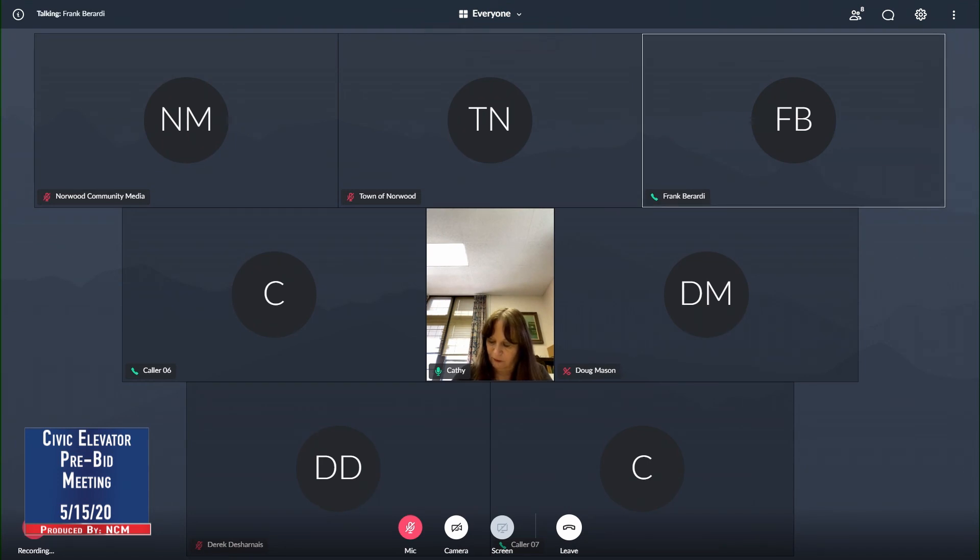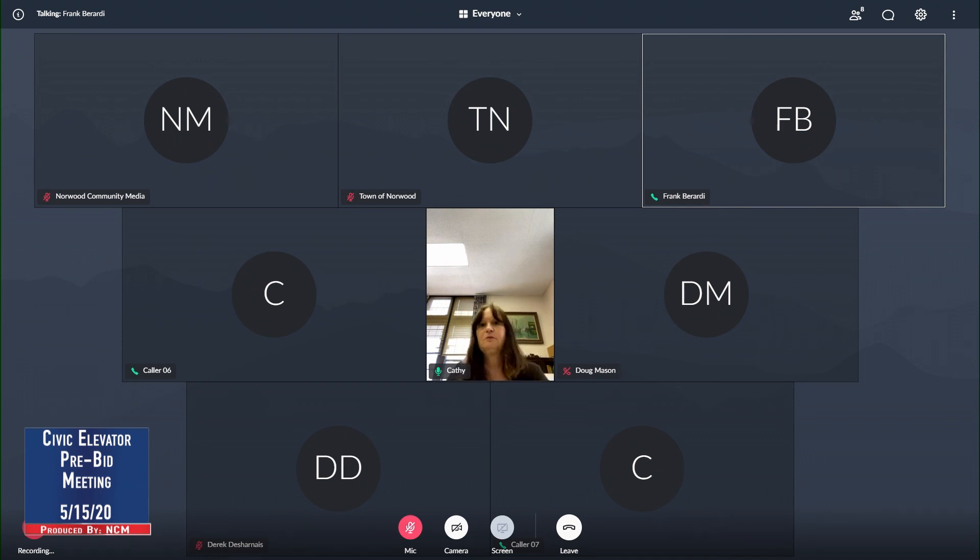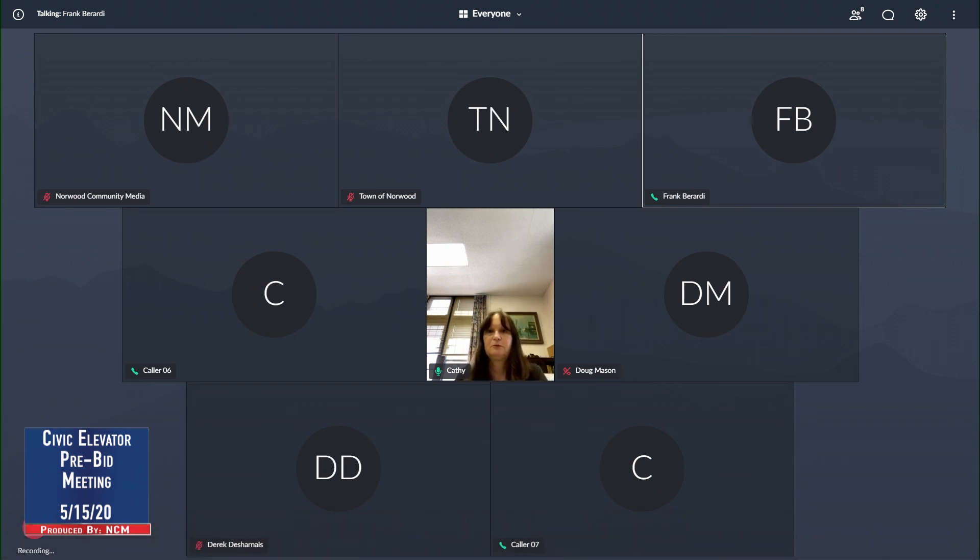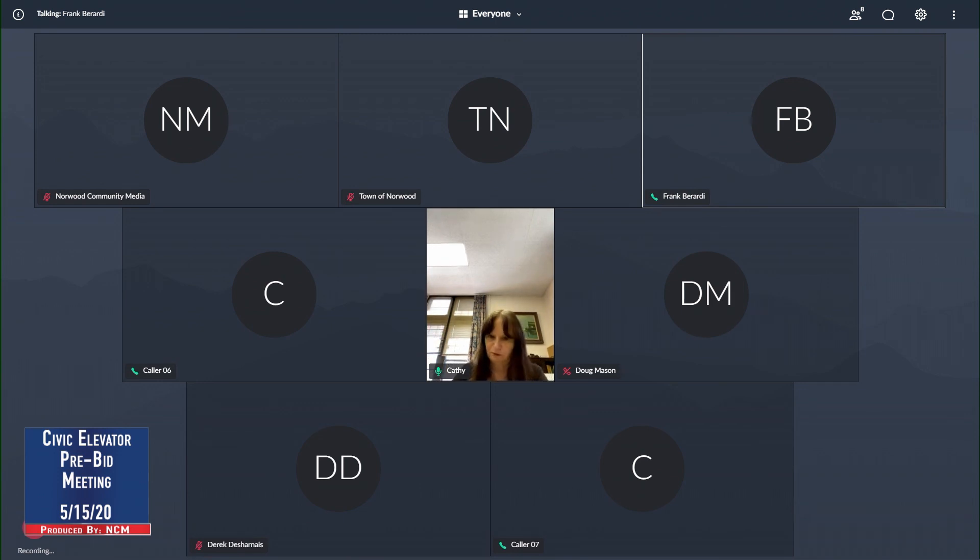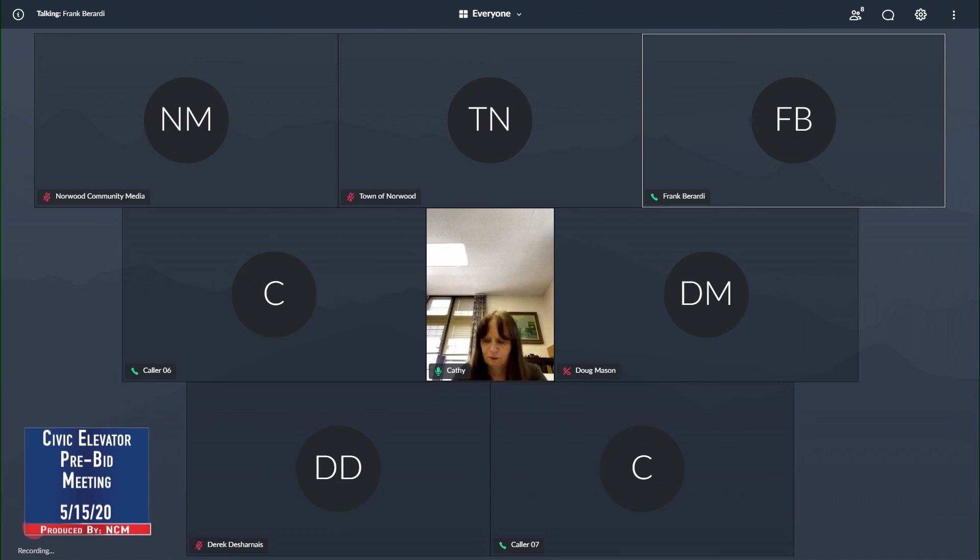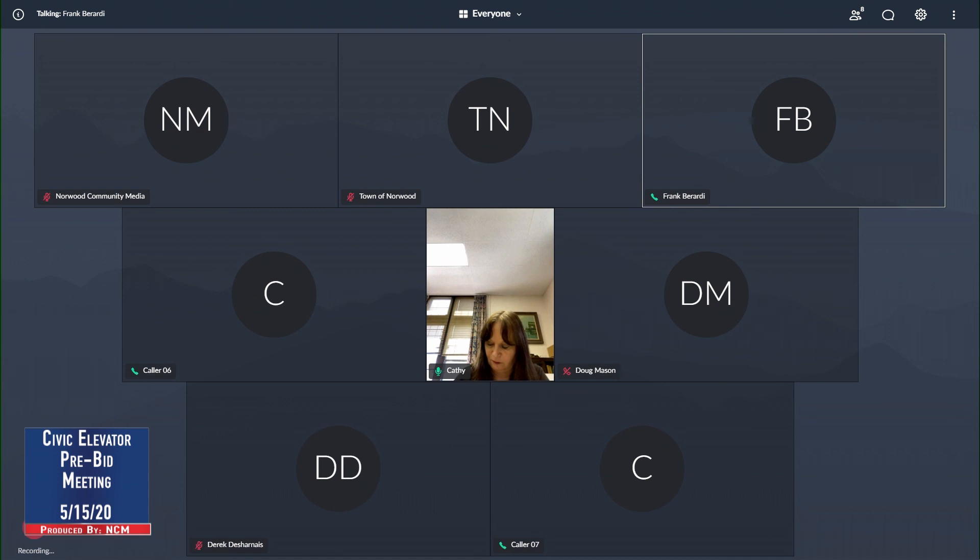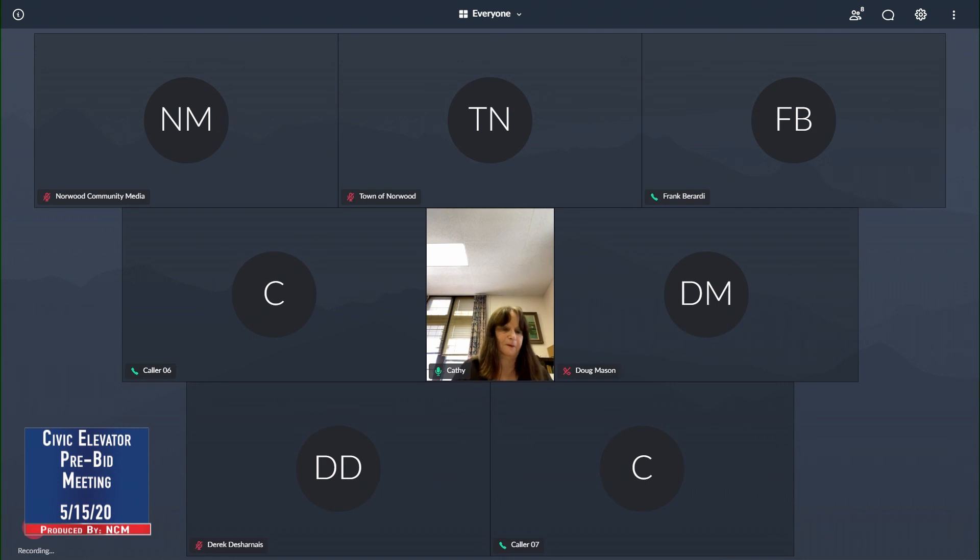We do have a couple of deduct alternates. One of them is for the cab interior, and then the second deduct alternate is for the replacement of the in-ground piston. The elevator machine room is actually located within the boiler room, which is adjacent to the hoistway. We're going to do some work to the walls there because they're damaged via water. So, you're going to be removing and replacing the current sheetrock they have on both sides there, get it back up to a two-hour rating. We're also going to flip the door as well, so you'll be putting in a new door.